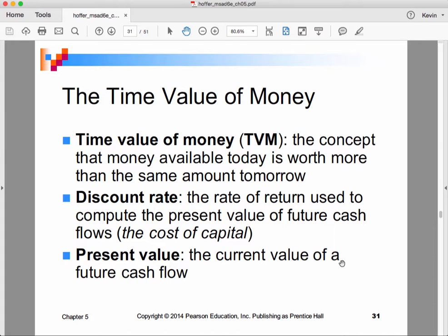Well, you need to know an appropriate interest rate. We call that the discount rate because of the following. Let's say we're going to get $100,000 5 years from now. If the interest rate is 5%, then on the basis of the net present value calculation, that $100,000 that we're going to get 5 years from today is really worth less than $100,000 today.